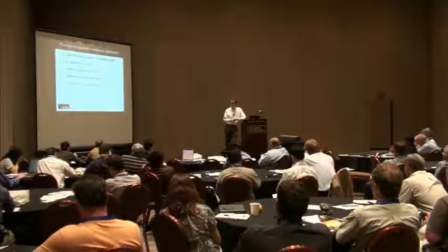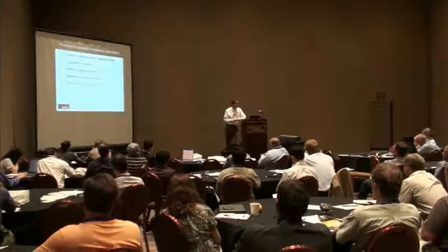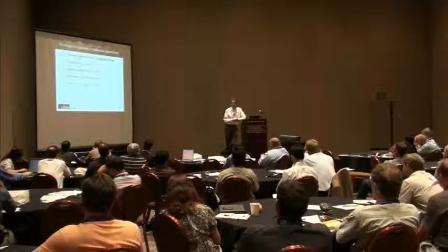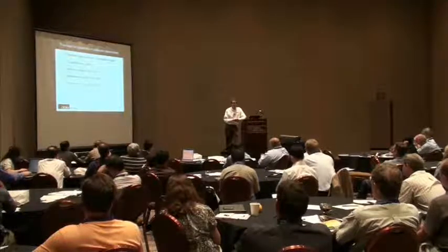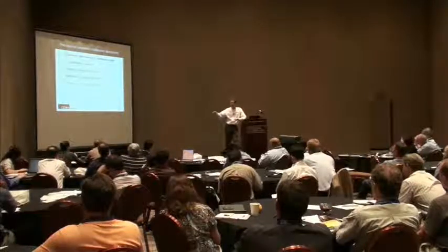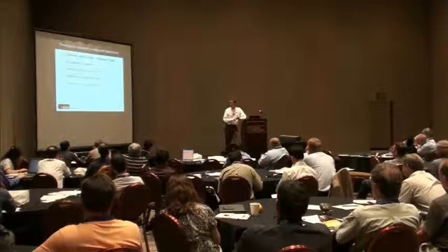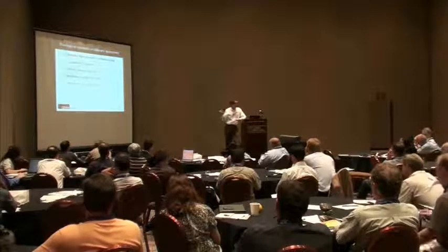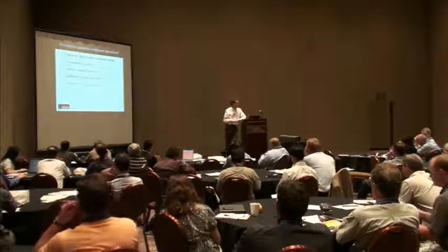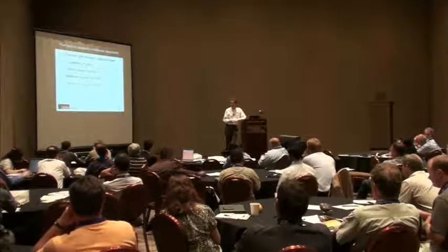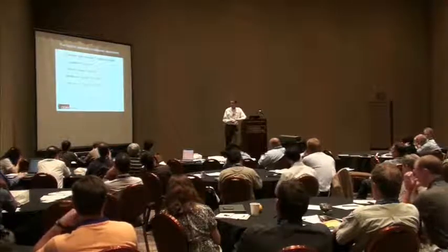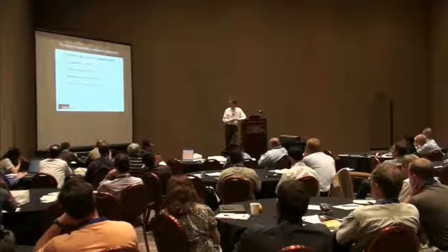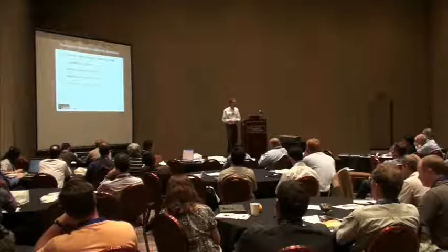And what you want to do is before they come on-site and disrupt your operation, you want to go and visit them. Because what will happen is if you say, all right, we're all ready for install. We'll come on-site, and sure enough, they won't have even started. So if you say you're going to go out there first, and you want to see shipping or receiving or whatever the use cases you have, this is an opportunity for you to go out, get to know all the people who are working on the code, make sure that it's not just sort of a one-man band, and also ensure that all that functionality is at least reasonably there.